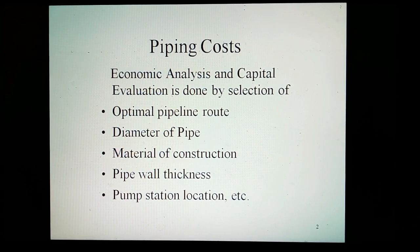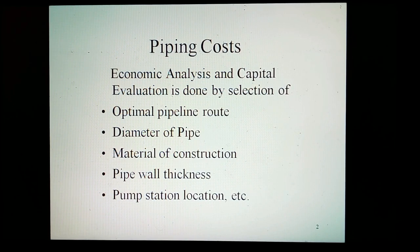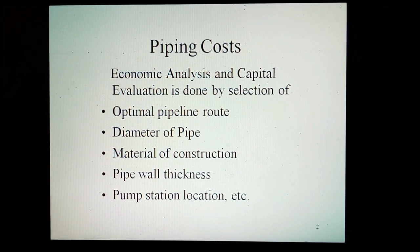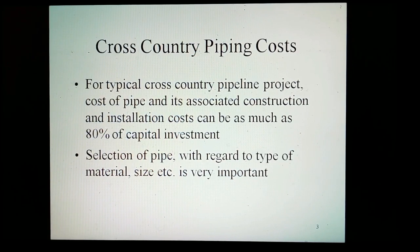The selection of the optimal pipeline diameter, material, wall thickness, and pump station location — pump units and operational equipment — is typically the result of economic analysis and investment capital evaluation of the most reasonable scenarios developed through the design phase. Even before a detailed design of a pipeline system is begun, an order-of-magnitude cost estimate will be performed to determine the feasibility of continuing to invest time and capital in the design phase. For a typical cross-country pipeline project, the cost of pipe and its associated construction and installation costs can be as much as 80% of the capital investment.